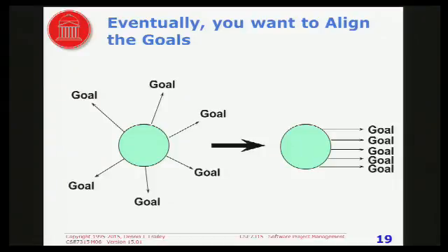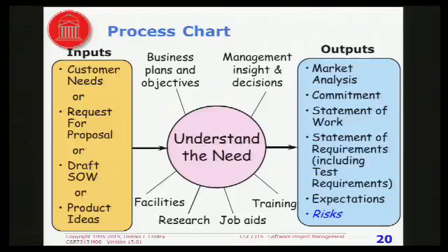For example, have a meeting with more than one of these people and get them to agree on the same thing. So that you say, well, you're telling me this, you're telling me this. Can you two agree on what I should do? It's one of those things that in theory you shouldn't have to do, but in practice you have to do it. Because if you don't, you're going to get pulled two ways, or more than two ways.